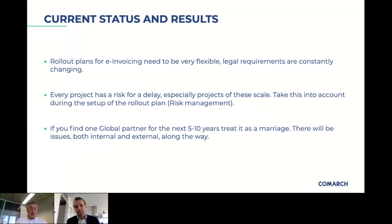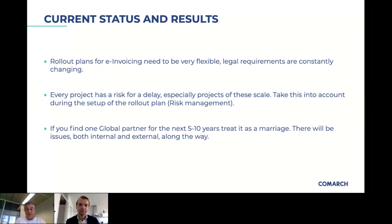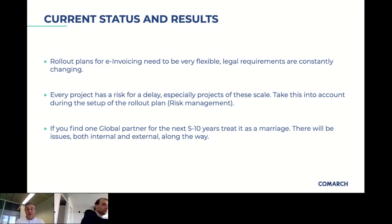Definitely. When everything runs smoothly, you don't get many complaints. But when things get more difficult — especially in the onboarding situation — you get more comments from the business as if the concept and processes aren't working. This is because invoices sent to customers are not delivered when onboarding is incomplete. An undelivered invoice means you can't collect payment, and you end up in internal discussions about whether the project is still the right way to go. But that's part of the project, and we are ready to continue those internal discussions.